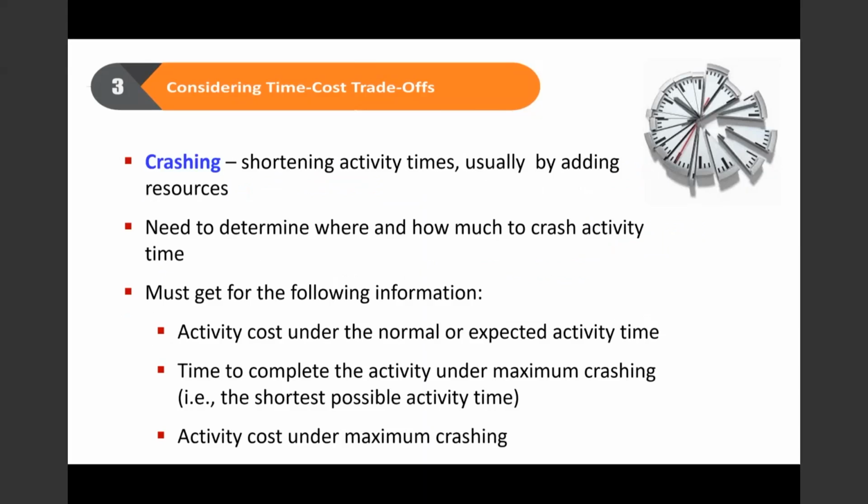Okay, where we try to shorten activity time by adding resources. But you cannot simply crash activities. You cannot just choose and say, oh, I want to shorten this activity or that activity. No, it doesn't happen that way. You need to determine where you want to crash and how much activity time you want to crash.